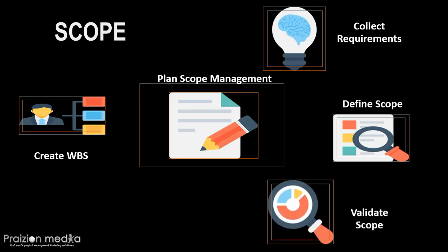The next process here is validate scope, in which the customer inspects the deliverable. Now, there is a huge shift from planning all the way to monitoring and controlling, where we have validate scope. In validate scope, the customer is checking the deliverables. Whatever those deliverables are, they are checked here. They could be documentation deliverables specified in a contract, plan-oriented deliverables, baseline-oriented deliverables, products, services, or results.